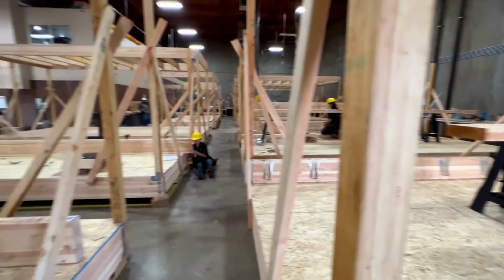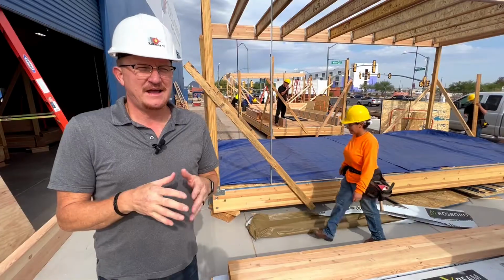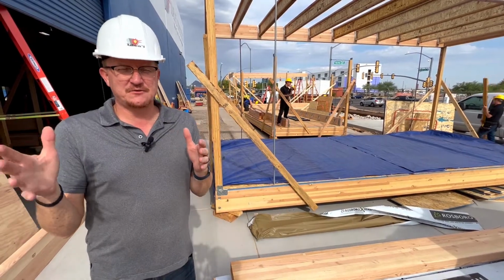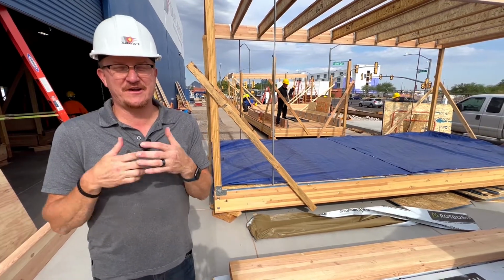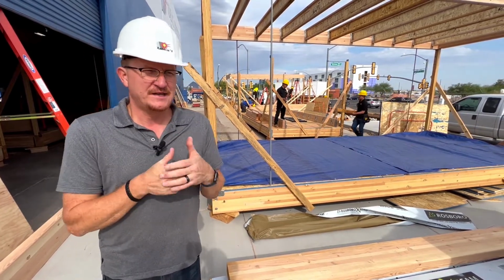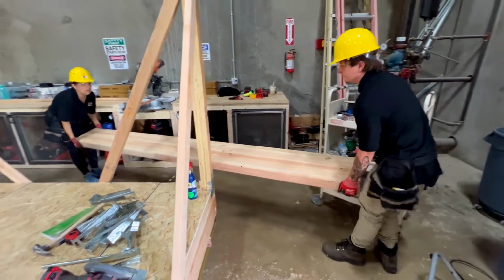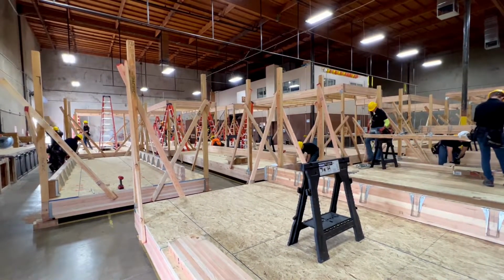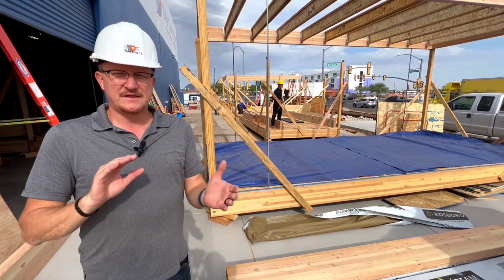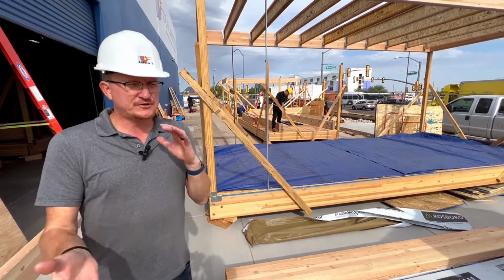So we have a general calendar or schedule for production and to be able to stay on schedule. And so as we run into hiccups, Friday, we ran into not having enough 3/4 inch plywood. So they started working on the next step, prepping their Glulam beams so that they could be ready to put them up in the morning. And then some of us had not have all our Glulam beams. So we're gonna work on the next step that we can do to prep things and just get them ready. So we're trying to be flexible.